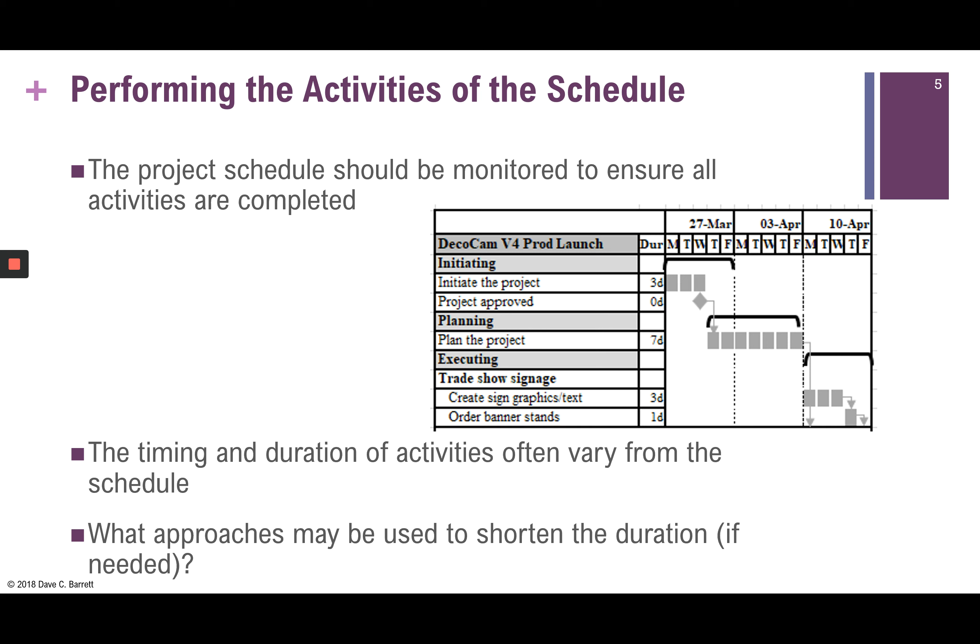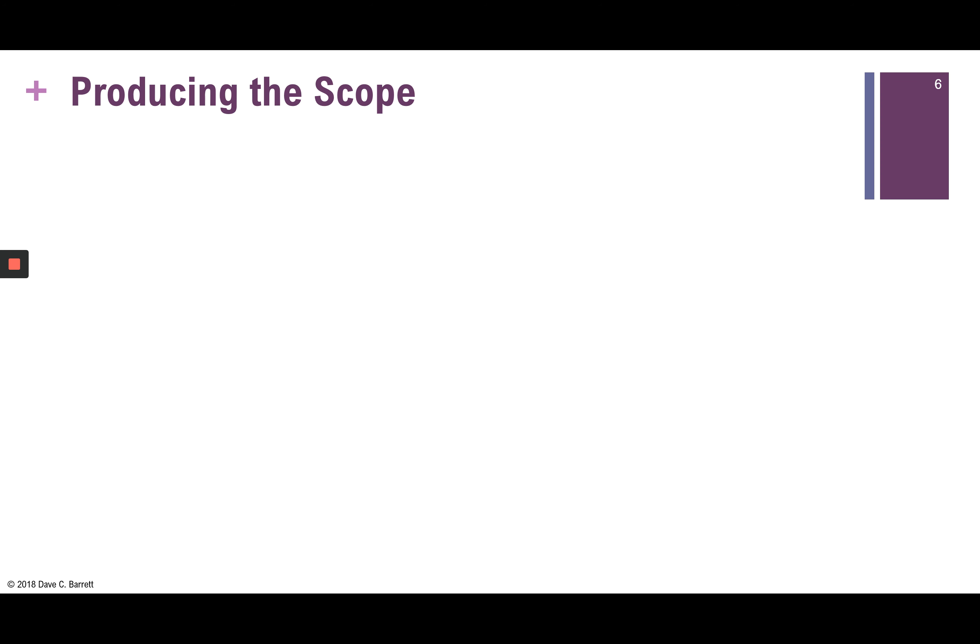Another option — though it can be difficult for the project sponsor — is to reduce the scope of the project, which would require sponsor approval. If there is less scope to produce, it can be done faster. So there are various approaches available to recover the schedule.